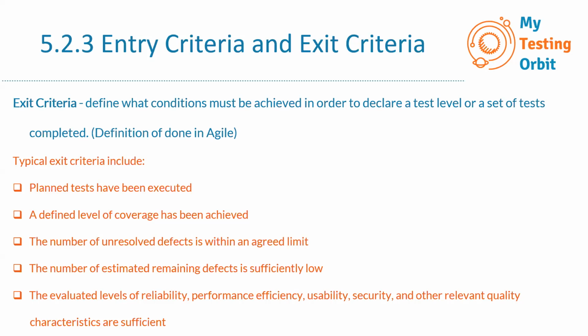So in this case, what happens then? It is acceptable if the stakeholders and business owners agree with the test managers that they are happy to accept the risk. So first of all, of course, they will review the risk, and if they are accepting the risk and they are happy, then that project or release can go live without exit criteria being satisfied as well.